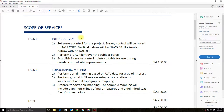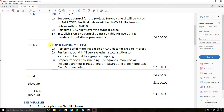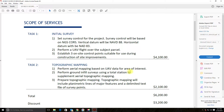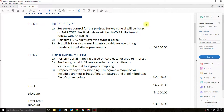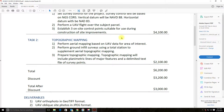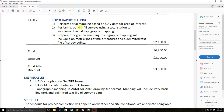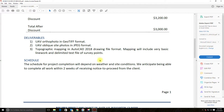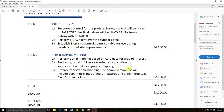Here's the scope of services. We have an initial survey and some topographic mapping. We're going to tie out some survey control, do a UAV flight, establish three on-site control points, then do aerial mapping based on the UAV dataset, do some ground infill surveys, and prepare basic topographic mapping — planimetric 2D lines of major features and a delimited text file. From discussions with the client, we also agreed to prepare a surface model with contour lines.